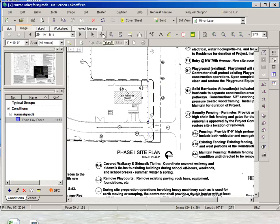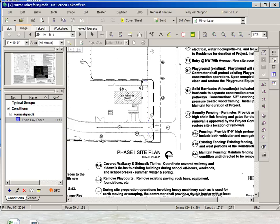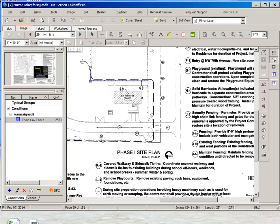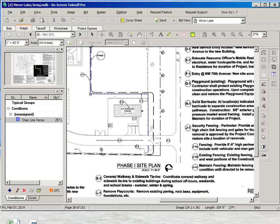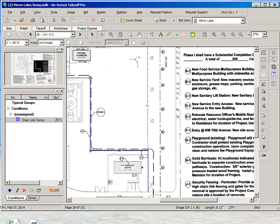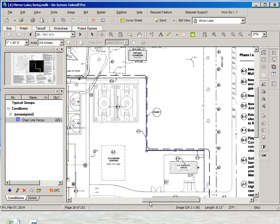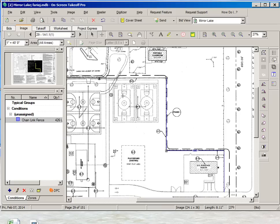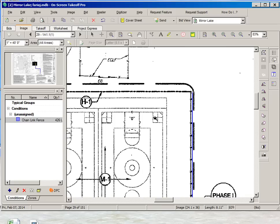So I am going to use the select button to extend the fence to this intersection up here and then click again on the takeoff tool to continue the takeoff of this chain link fence. So then we go up, up to this point and we want to stop at this intersection, this intersection here. I will stop by double clicking on that point and I will not go any further because the rest is going to be H1. So this is different type of fence.